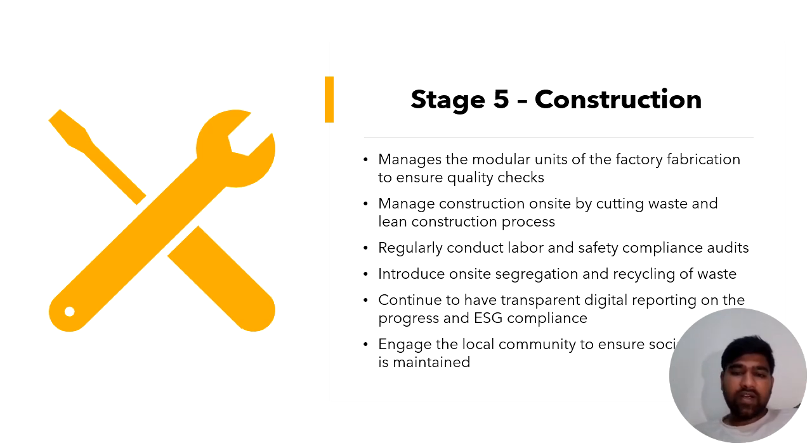We also maintain a high level of transparency using digital reporting tools. These track progress and ESG compliance, and are shared with both internal and external stakeholders. The local community remains engaged to ensure ongoing trust and support. A construction audit acts as a gateway to confirm that all ESG performance metrics have been met before handover.